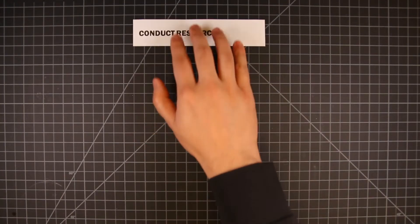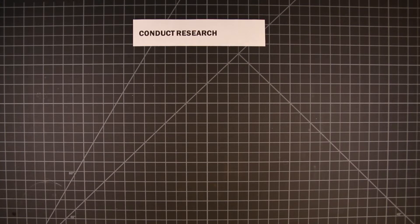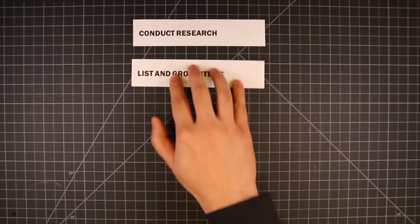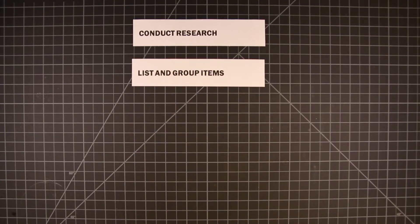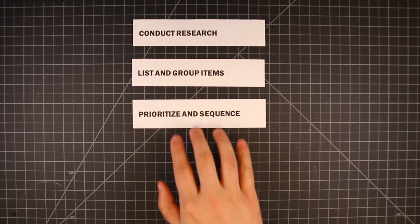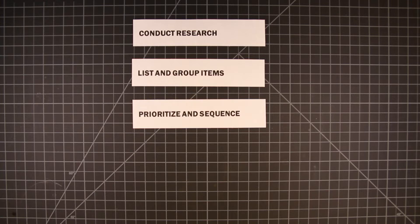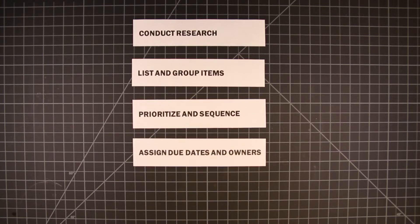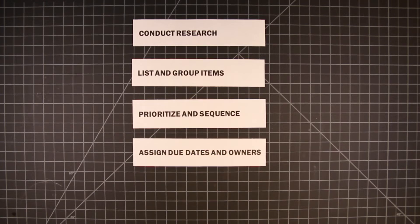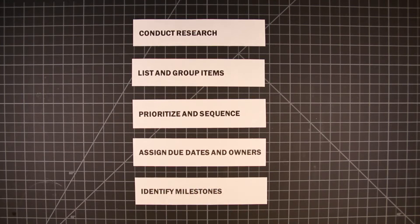So to recap, how do you build a plan? You start by researching what is already out there. Then you list out the items you want to do and group them into categories to help you organize. Next, prioritize and sequence those activities based on known constraints, dependencies, and your own logic. From there, assign due dates and owners when appropriate. And finally, identify key milestones.